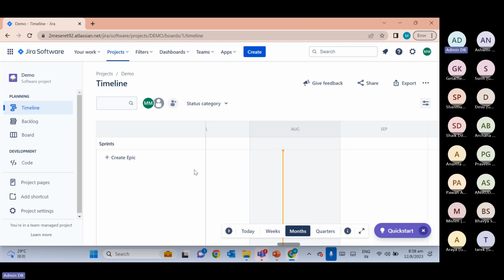Okay. Let's say in the same team, there will be one person having 10 years of experience and one person having 2 years of experience. So definitely the team cannot expect that they will do the same task. A person having 10 years of experience should be able to do more tasks, maybe double the tasks that a 2-year person can do. Okay. So based on their capability, we used to estimate how many story points that developer should deliver.